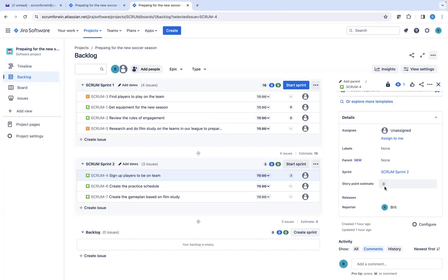The reason why this is important to understand is because that's why we did this scenario. That's why we did these examples. We'll go back to our example, Danny. Danny has a capacity of 8. And if Danny has this card for this sprint, he's at capacity. He's hit his 8 for this sprint. So that means another developer has to take on this responsibility, and so on and so forth. Let's say if this was only a 3, that means he has the capacity of 5 more points.